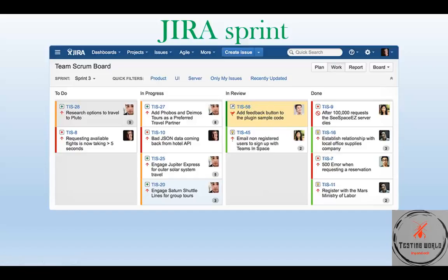After the reviewer finishes, they can move the item to done and log work. In the bottom right corner you can see a number — it's the story point for that item. When you spend time on development or review, you can log your work by opening the item and entering the actual number of hours spent. It's very useful to see which item has which status — you can see the progress, how many items are assigned to a specific person, how many are in progress, and how many are ready and done.